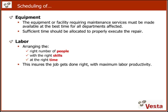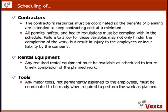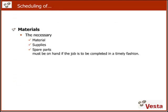Let's look at the effects scheduling has on different areas. The equipment should be shut down at the best possible time for all involved parties, and sufficient time should be allocated for proper execution. On the labor side, you want to arrange the right number of people with the right skills at the right time to optimize resource utilization. Scheduling of contractors allows optimization of contractor utilization and minimization of contractor cost. The same applies to rental equipment, which only needs to be rented for the time it is needed. Major tools like cranes must be coordinated to be available when needed. Scheduling prevents conflicts on one hand and underutilization on the other. Necessary materials, supplies, and spare parts need to be available to execute a maintenance task in time.